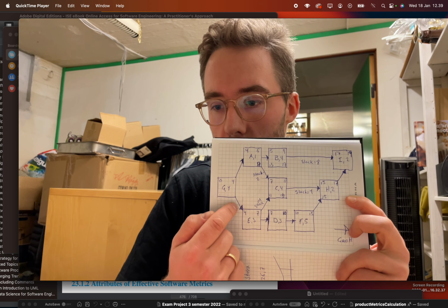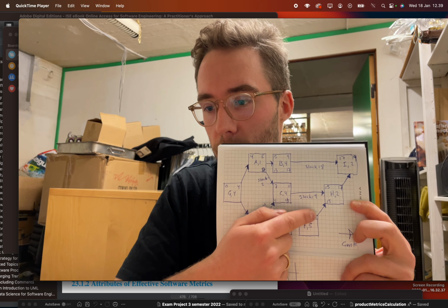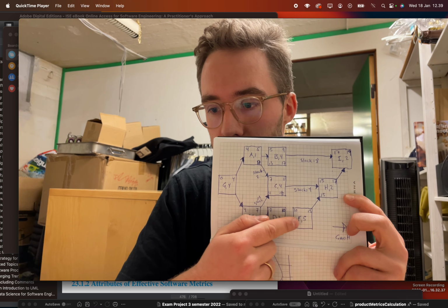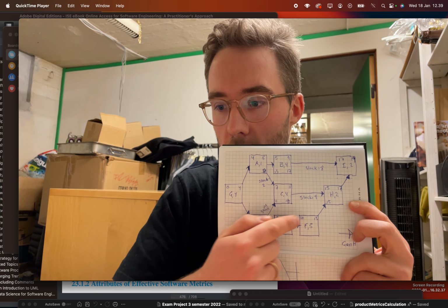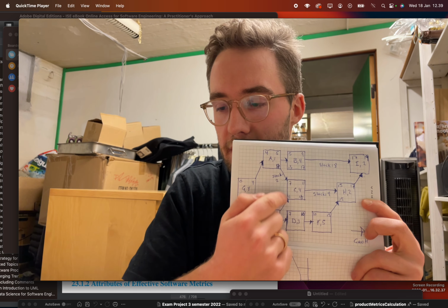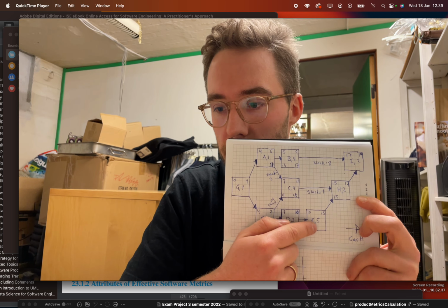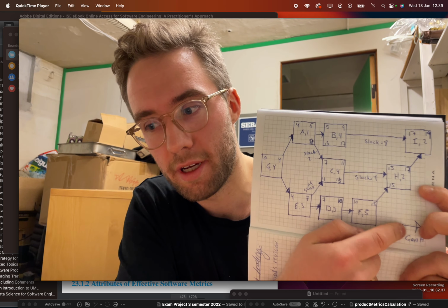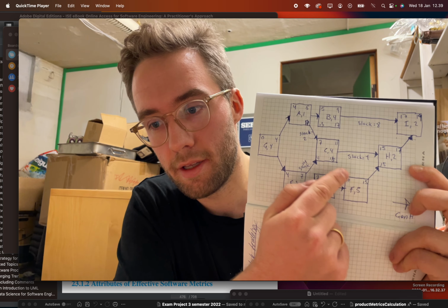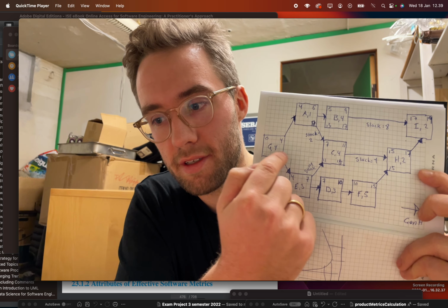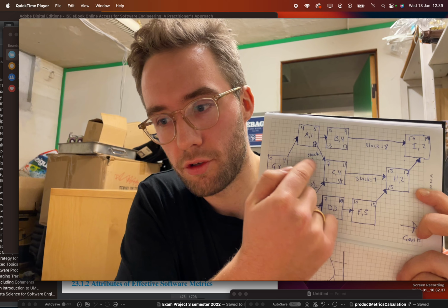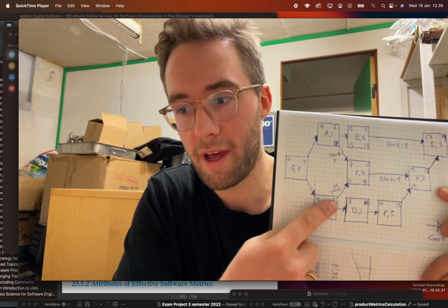Going here will be our critical path, because our critical path is the way that is critical for us to finish at I, and that involves a lot of tasks. That is what the task network diagram can show us: in this path of tasks, the way we structure our user stories, this is the critical path down here.